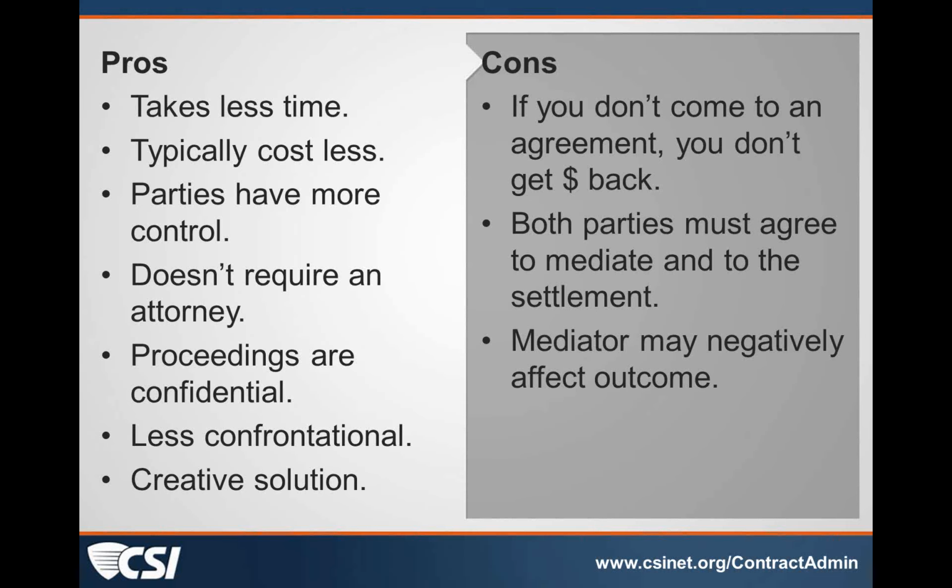If you don't come to an agreement, then you're probably going to be moving on to the next phase of dispute resolution. Another con is both parties have to agree to mediate. If one side wants to mediate and the other side doesn't, you can't force the other side to mediate unless you've written into your contract that mediation is going to be your method of resolving disputes.